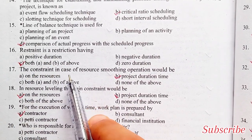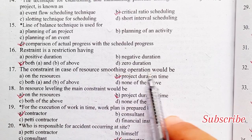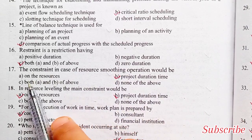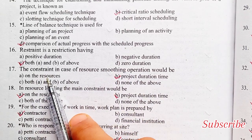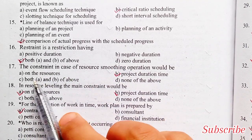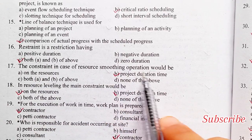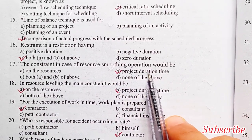The constraint in resource smoothing operation will be on: the resource, project duration time, both A and B, or none. Option B is the right answer — project duration time.